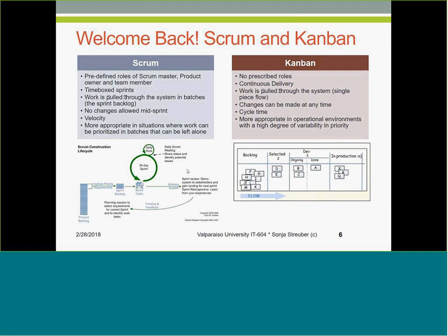And then, of course, we have the retrospective, at which the user decides whether or not to accept the results from the sprint, and that's always nerve-wracking, but after a while you get used to it. So then we enter the new sprint with another review of the product backlog, and then the product owner gets to pick the next user stories that we work on, and so on and so on, until either the time is gone, or the money is gone, or the product backlog is gone.